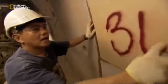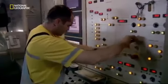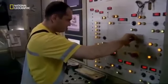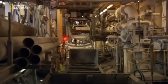March 2007. The TBM and its crew is just days away from their prize, breakthrough point at the tunnel's northern end. 19 more rings to go! But what happens next comes without warning. A huge drop in pressure on the slurry pipe feeding the TBM. Suddenly, hundreds of liters of thick slurry are flooding the tunnel. The slurry shorts a key electric cable. The TBM grinds to a halt.